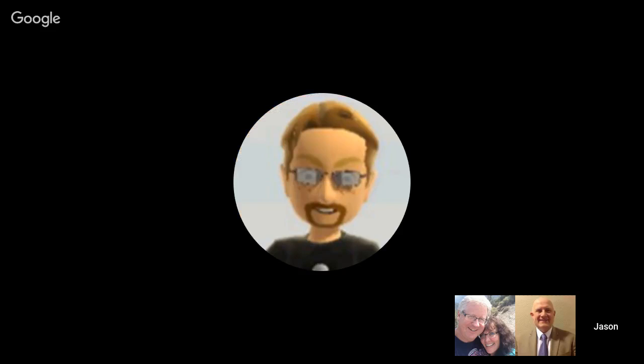And then the final one, question 9 for team. The team, I score a 7. The team commits collectively to the sprint goal and to the backlog. Number 7. Agreed. Okay, so all agreed. That gives us an average of 8.6 for our Nokia test score, which just seems to be a pretty good score.